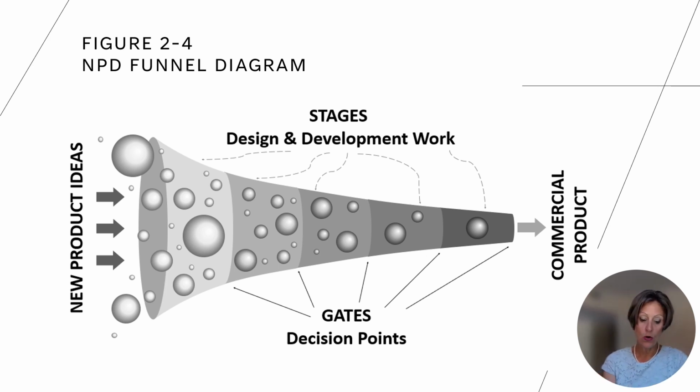The second goal of a waterfall process for NPD is met during the routine gate reviews of the project. After each stage of work is completed, the project viability is reviewed by senior managers to determine if the innovation effort should continue. When gatekeepers approve of the work, including the critical element of strategic alignment, the project advances to the next stage. As an analogy, a petrochemical product advances through a staged and gated system from test tube trials